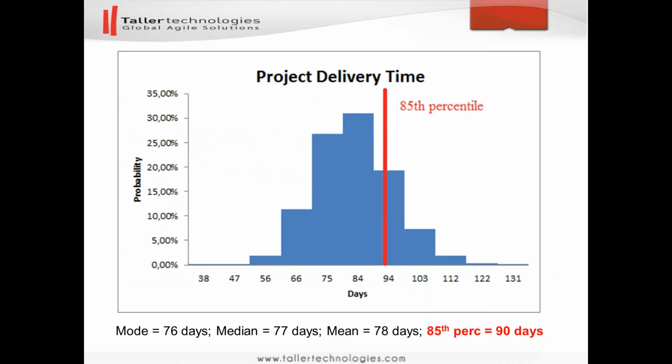Exactly. Another question is, how are you able to determine how many work items appear in each leg of your Z-curve? I would think that the first leg, stories and experiments, drives the number of items that will appear in the later legs. Exactly. Thank you for this question. The first leg is a setup time, but mostly it's time for failure, for experimenting. This is the time the team allocates for doing experiments, and we assume that some of the experiments will fail. So after analyzing the scope, the team should decide what kind of experiments to try, and that's the number of work items.